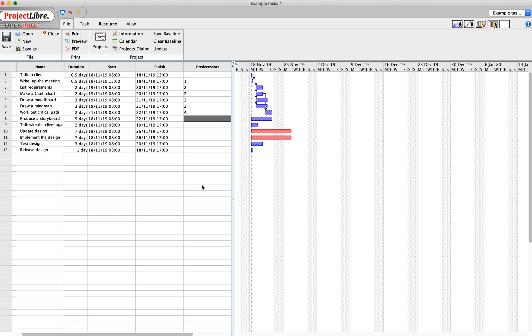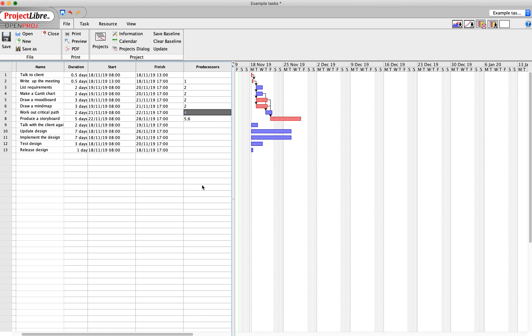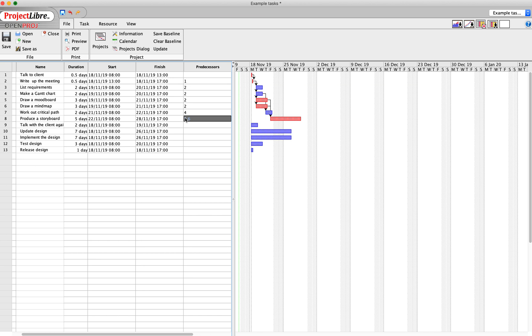Producing the storyboard - to produce a storyboard, I'm going to say you need to have done the mind map and the mood board. So to have multiple predecessors, you just use a semicolon, so five, six. The critical path and Gantt chart don't need to have been finished before then, that's okay. But actually, you probably need a list of your requirements before then as well. So let's add that in there: three, five and six.